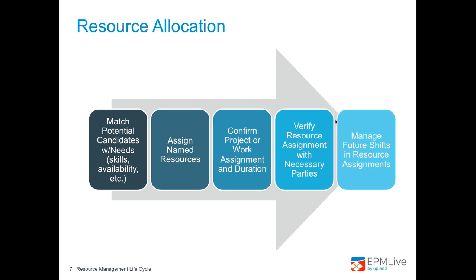Resource allocation. So now it's time to assign your project team. Before we do, though, you have to look at all the factors involved in this process. Who's available and when? What competencies or experience do the resources possess? Have they worked on a similar project in the past? And if so, how well did they perform? Are they interested in working on the defined project? And finally, how much will it cost to obtain the resources for the project?